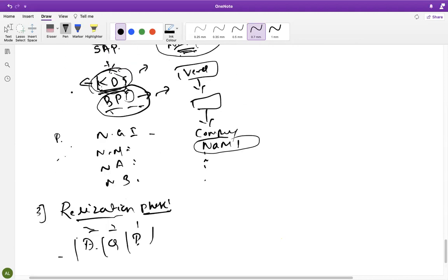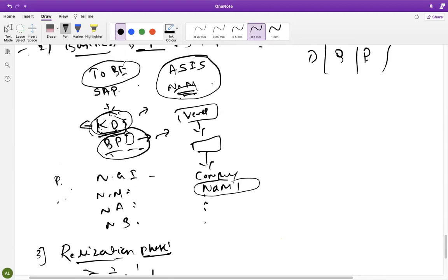Here, in the business blueprint phase, we have prepared the As-Is and To-Be documents. We have agreed that these things we want to do in SAP, I showed it to our business, and these people agreed. But some things we will not do in SAP. These people are telling, I want a material number created with more than 50 characters, like that length I want. In that material I want separate, different fields, which are not there in SAP. Anything which is not there in SAP, if these people are asking, initially we'll give a workaround solution.